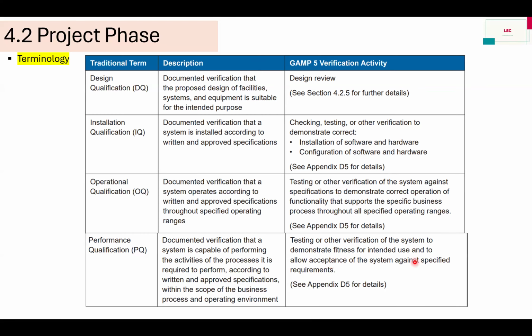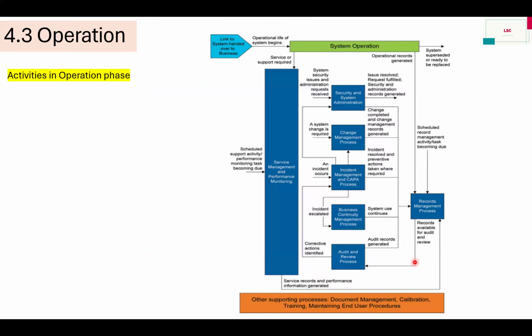So after this terminology, we are going into the operational phase. Okay. In the operational phase, as you know, first of all, we have to hand over our system. Okay. And there is a process. What process? There is a summary report, and after that, the release note. In the release note, it is clearly written that the system is fit for your intended use in the routine environment. So this comes in the handover stage.